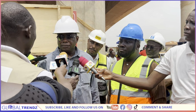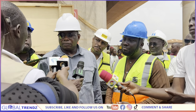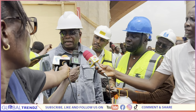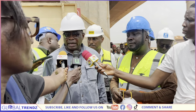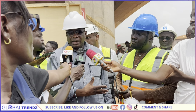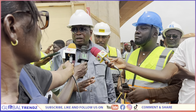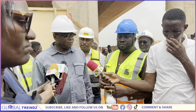For the layman and the media, we are interested in the timeline. From where you sit, can you give it? Well, for instance, the regional minister volunteered to work with Ghana Water and authorities to work out how to do the relocation of the services. He cannot tell me, he's yet to engage them. And you heard the engineer saying that they necessarily need that relocation to be done to drill the rest of the piles. So the contractor has got a works program which we are working on now, and we are sure to determine that at this stage.